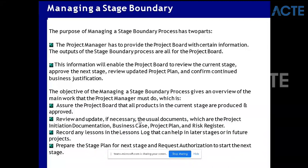After finishing a stage, you may need to update documents. For example, if you agreed to finish in five weeks but now you'll finish in four weeks, you go and update the project initiation document, business case, and project plan. You keep updating these - these are all working documents. Any changes after one stage of Managing Product Delivery, you'll go and update if required. Not necessary to always update - sometimes you may be following exactly as planned, then you don't need to update. Because of this, sometimes the project might extend and you'll have to update your business case accordingly.